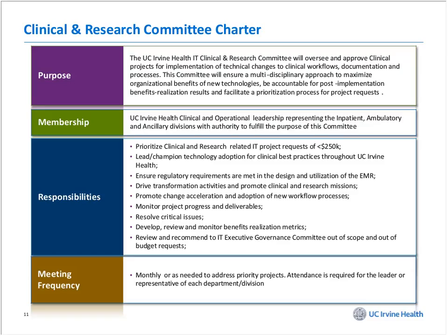when you talk about capacity planning, you may have 5 projects in the ambulatory area and 4 projects in the inpatient area, but you can only do 5 of the 9 that are approved. And so ambulatory and the inpatient operations group have really got to start looking at what's best for the organization and possibly give up their #1 priority because the #1 priority in another area is more important to the organization. Now that takes time for them to get into that mode because they're focused on their departments typically. But again, you've got the Executive Governance Committee as a tiebreaker on any of this stuff.